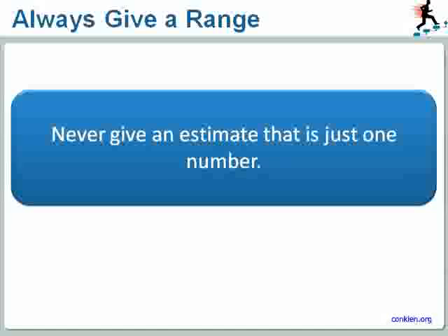If you tell your supervisor that this will take exactly 2 months, then this is the number that he or she will remember, and it's also the number that you will be held responsible to. And it doesn't even matter that this was just a friendly conversation over a cup of coffee. You said 2 months, I heard 2 months, and therefore it's going to take 2 months. That's why we always give a range when we estimate.